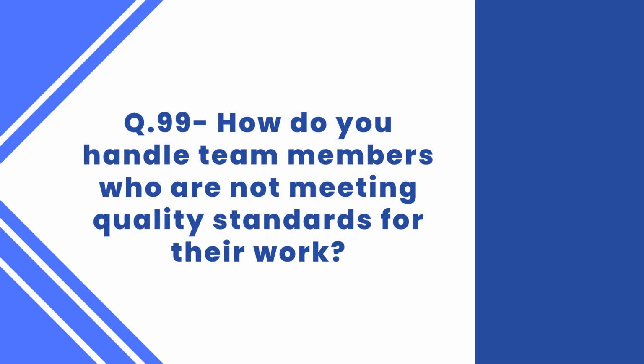In a different IT project, I implemented a buddy system where team members were paired with a buddy who they were responsible for working closely with throughout the project. This helped to promote open communication and collaboration amongst team members and improved overall productivity. Overall, it is important to address the issue of lack of collaboration in a timely and effective manner, and to implement strategies that promote teamwork and open communication throughout the project amongst all of the team members.